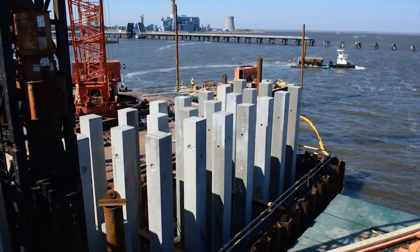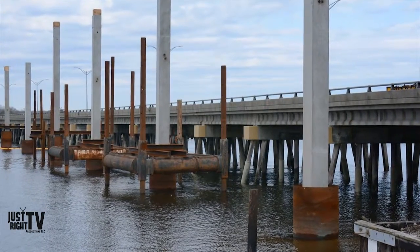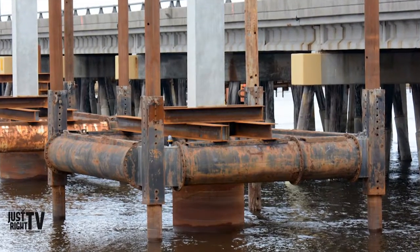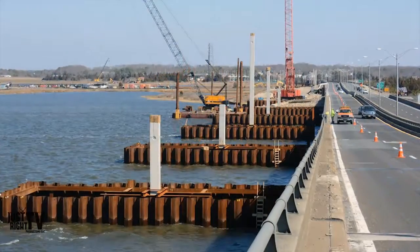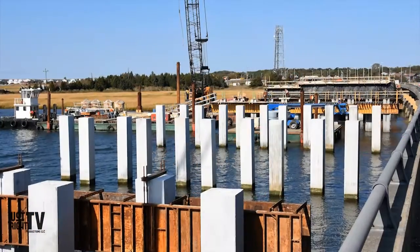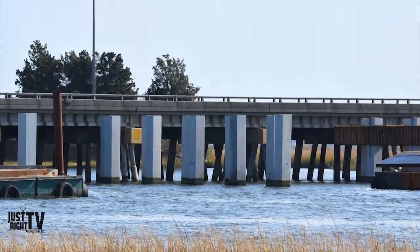Our piles ranged basically from 80 feet to 130 feet. There was a test pile program done at the beginning of the project, and we drove piles 150 foot in length and drove them to their full length to help identify the supporting strata in the ground. And that information that was collected turned out to be the basis for the rest of the piles driven on the project.